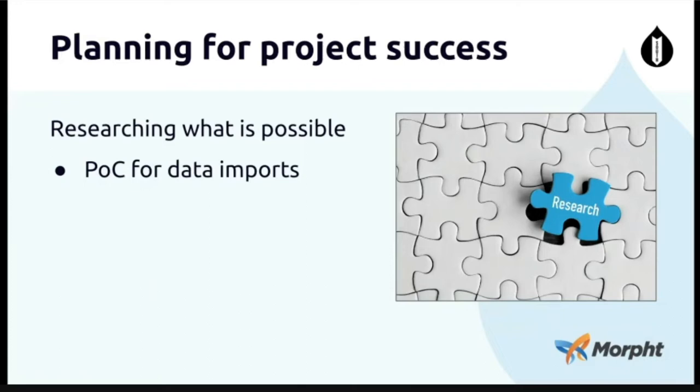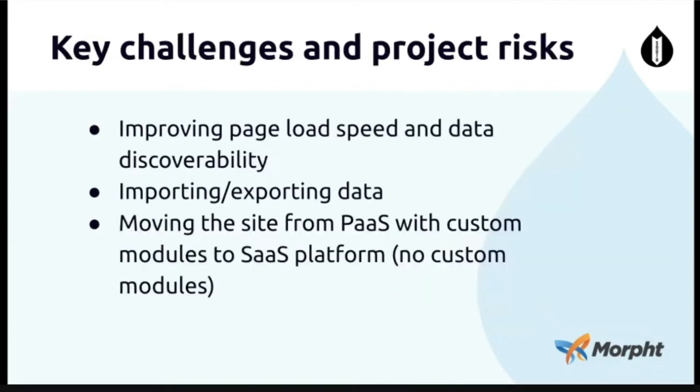We planned in a number of ways, and one of the key things that we really wanted to demonstrate very early on was the fact that we could do some data imports into the site that could be controlled by content editors. So we did a proof of concept very early on to demonstrate that we could deliver that key deliverable.